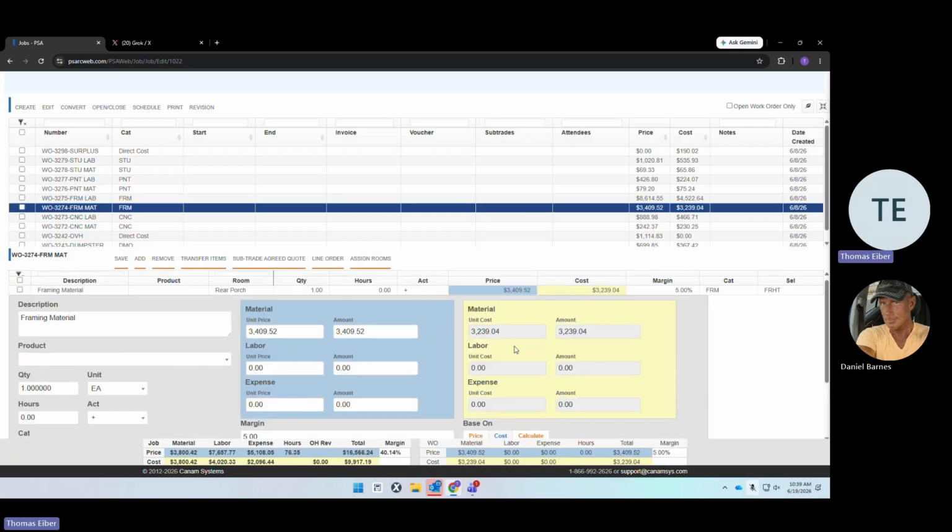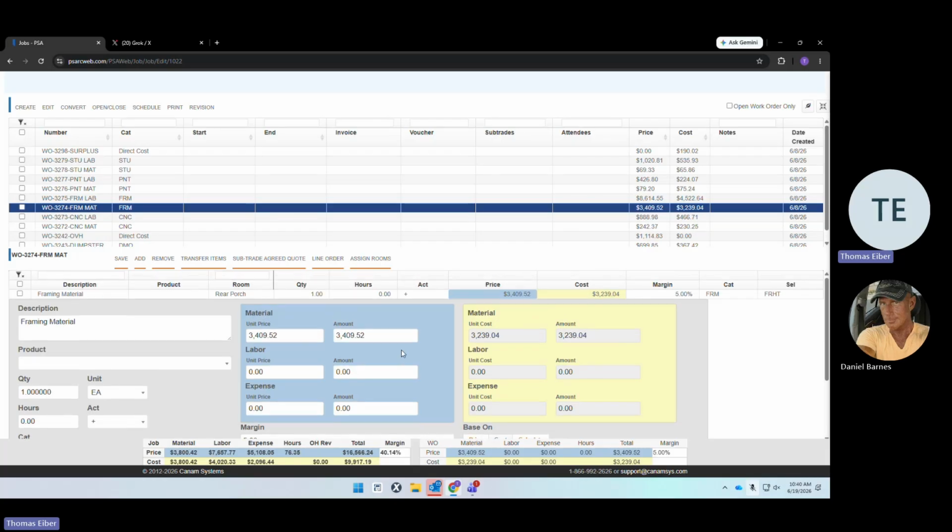Next, we've got these 2 blocks. We've got a blue block and a yellow block. As a PM, you're paying attention to the yellow. So this yellow money, kind of a funny thing we've used in the company and it's helped everybody remember is that yellow means that we can piss it away, right? We can spend this money. This is money for you as a PM that you can spend. Spendable money. Blue is what we're charging the client. Typically as a PM, this isn't available for your view to see what we're charging the client. Not that we don't trust PMs with that information, but it's not relevant. You care about what you can spend, not what the client paid.